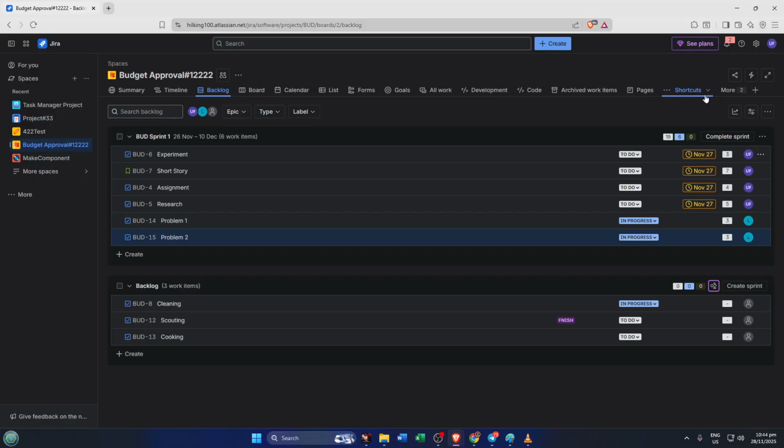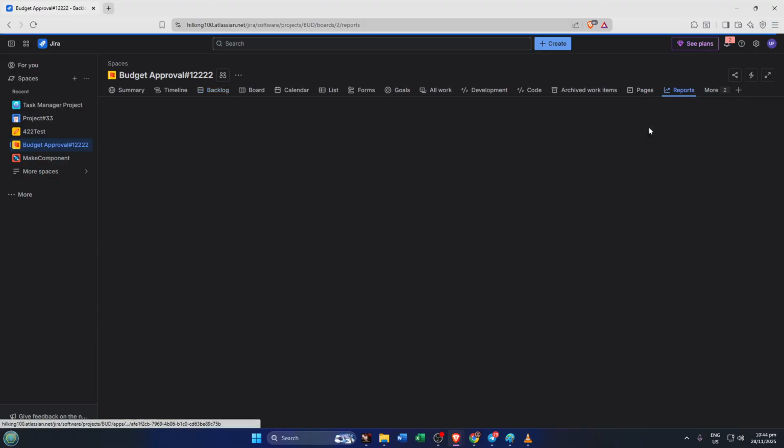Next step, the critical hinge on which your Burndown chart swings is to make sure each issue in your sprint has a value in the field you opted for in the previous step. Let's say if you selected story points, every story in the sprint must have a value entered in the story points field. Now the anticipation is building up, right?